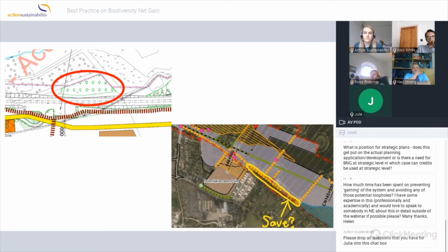And there was another option further away, but that involved pretty much doubling our haul road use of vehicles, and it was much nearer the local village. And that was just too much of a trade-off, with doubling our vehicles going up and down and the disturbance to the local village. So we don't win every one that we try and put on the table. And we live in a world of construction which is all about finding that middle balance. We didn't win that one, but that doesn't stop us from trying.